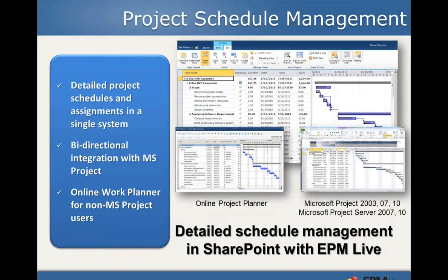We add a scheduling tool to SharePoint, meaning you can use Microsoft Project if you want, because we have a bidirectional integration with that that's very common out there. But our online project planner allows you to do all the basics, build a work breakdown structure, add tasks, dates and durations, add resource assignments, dependencies, all those types of things that 90% of the folks do can be done right within SharePoint without ever leaving the web browser. So this is something that's added from a value perspective.